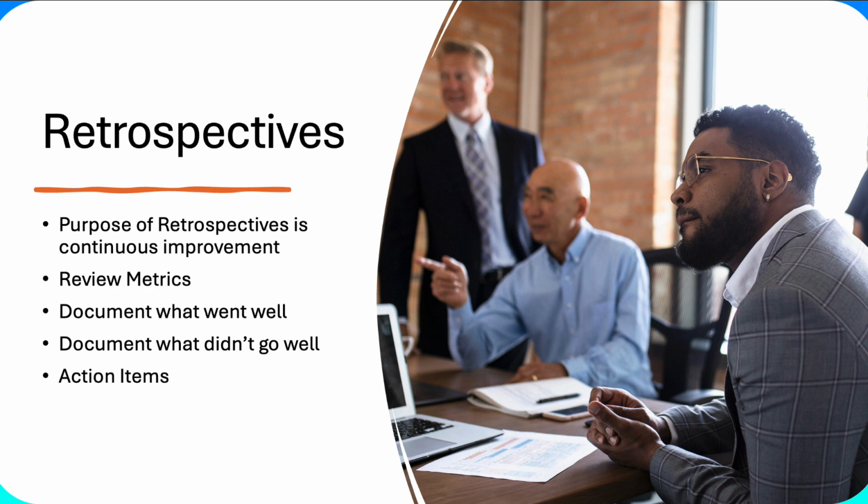Immediately after the end of sprint demo, you should have a retrospective. I think it's a best practice that just the two meetings go together. As soon as the end of sprint demo is over, you can dismiss all the outside stakeholders. And this is your meeting as a team to improve the process. And that is what it's for.